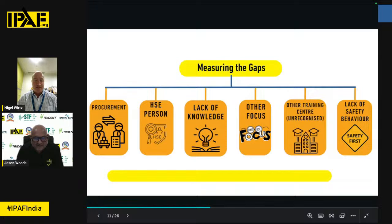And in fairness, I think that's always been the case wherever we work. But it's good to see that the thought of how we get there is now coming in at an early stage. One gap which I can see is, as a project moves from one phase to another, the type of equipment changes, but the rescue plan stays the same. I'm not sure whether we see a lot of revisiting as we go to phase 2. Maybe the roof goes on, for example, so our access is now slightly different to phase one.